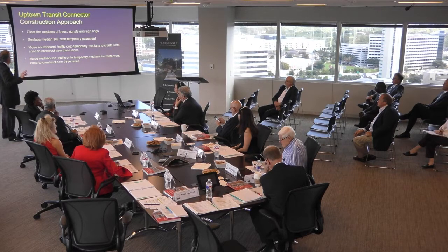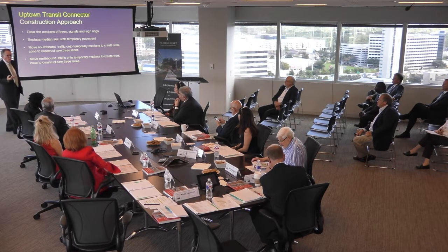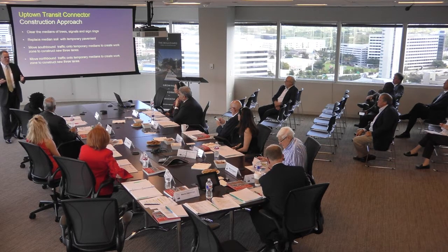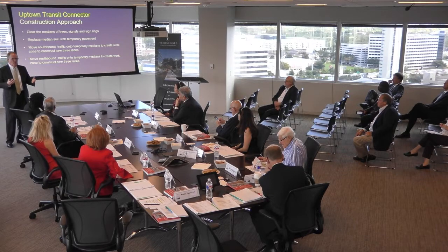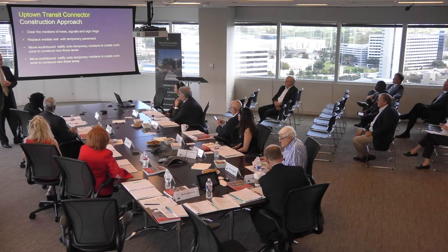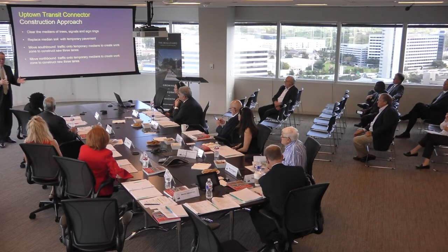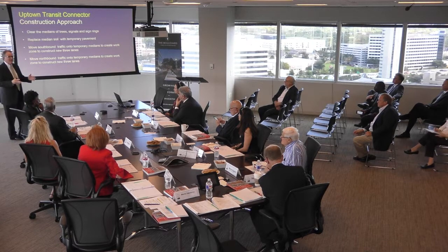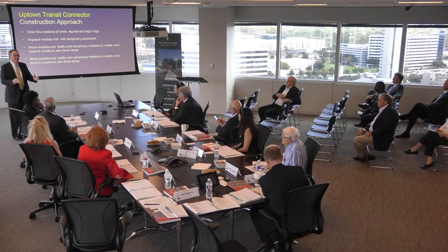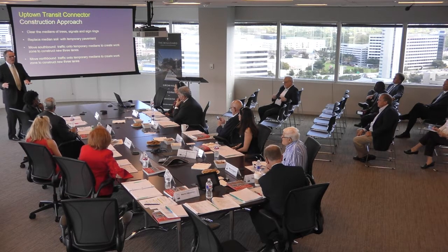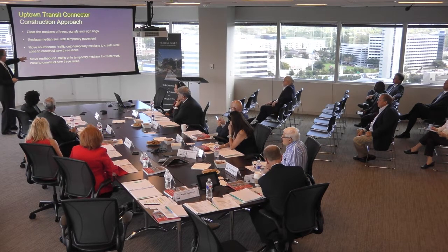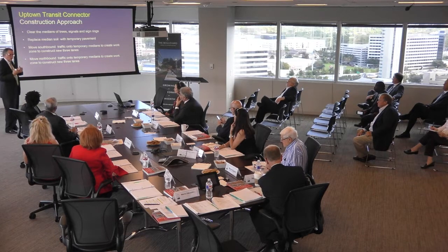In terms of construction, you have heard this before, I'll say it again, but in presenting this to the mayor, it's important to let him know that in a downtown situation, if you're building on one street, you can easily divert traffic to other streets. But in Uptown, we really don't have alternatives to Post Oak Boulevard. So we have to take the right-of-way we currently have and improve it by taking out the median, and we can use it for temporary roadway, and then we can use the additional right-of-way that we're acquiring. So we can move traffic onto the medians and build 3 new lanes southbound.